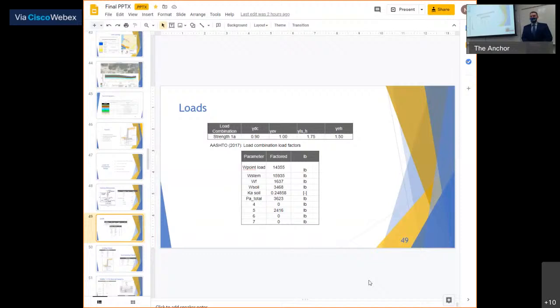Well, I think from my perspective, you did a great job. One of the things in developing your construction timelines and those cost estimates, make sure that you are including in those finalized numbers presented to your client, times that are going to include right-of-way acquisition. That's not a fast-moving thing. This won't be a six-month project, and you don't want to oversell the speed at which you can accomplish this and those land costs. It's a process, and one that TxDOT goes through far too often.